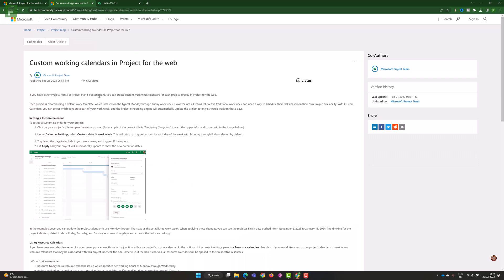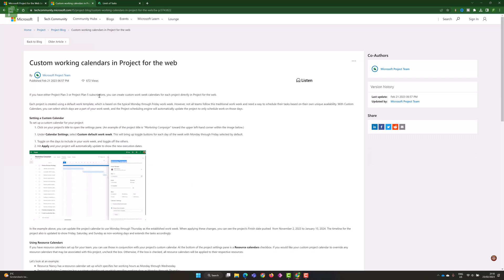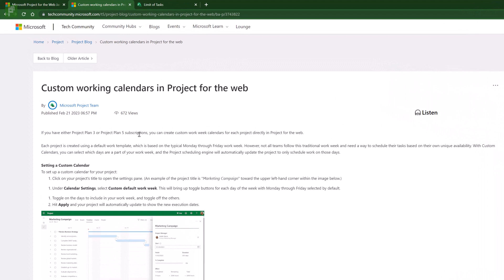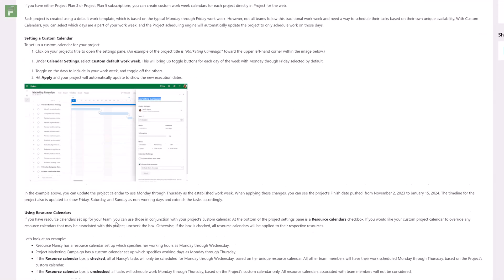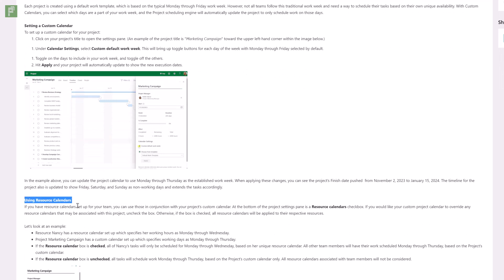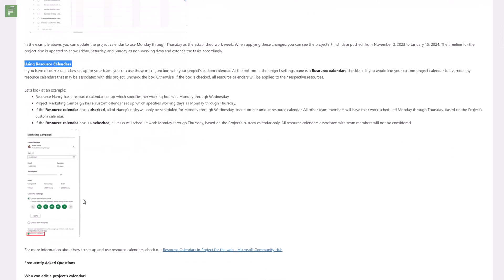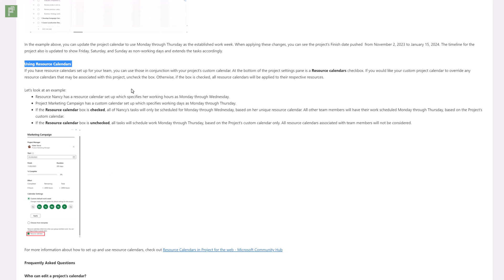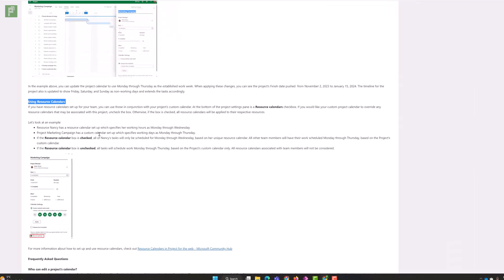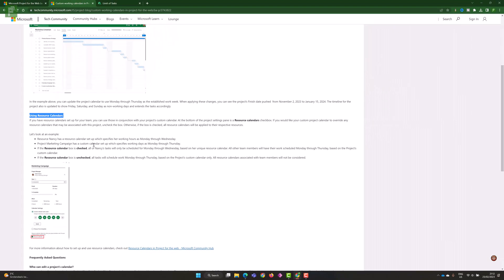Our last bonus update, received just the day before yesterday, is custom working calendars in Project for the Web. This was already a little bit presented during my last video, but now with an added 'using resource calendars' option. If a resource has a local calendar which is different than the actual calendar in the project schedule, we can now say that a project needs to adhere to that custom calendar from that resource. If you have that box unchecked, all tasks will be scheduled normally based on the project's calendar instead.